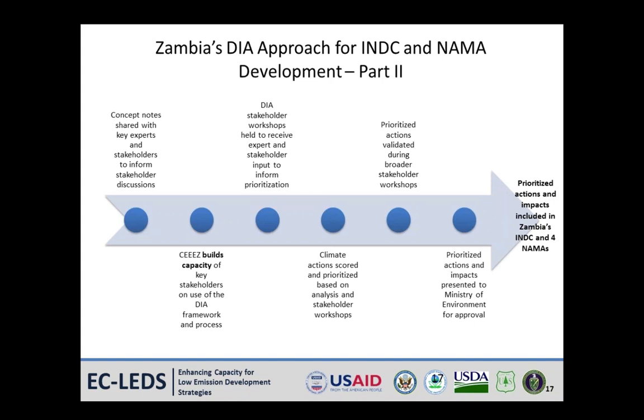And then the other reason why we needed to hold this workshop was to, apart from having to get information and share the DIA framework, we also needed to prioritize some of the projects and programs which were being proposed by the key stakeholders and experts in the workshops. So we had to score and prioritize the impacts based on analysis from this workshop that we had held.